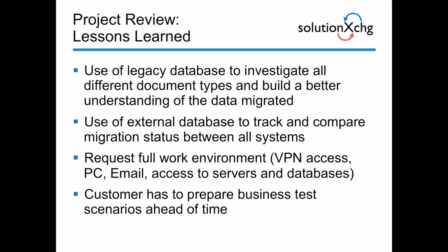We're working with customers that have all PDF documents stored, but typically archiving solutions that have been in place for 10 plus years started out with TIFF, eventually added some documents like plain Word documents, Excel documents, or other document types, and then slowly consolidated or standardized on PDF documents. But that's important to understand. It's important to understand how you're going to view documents that are older and whether there is a need to make a format conversion during your migration.